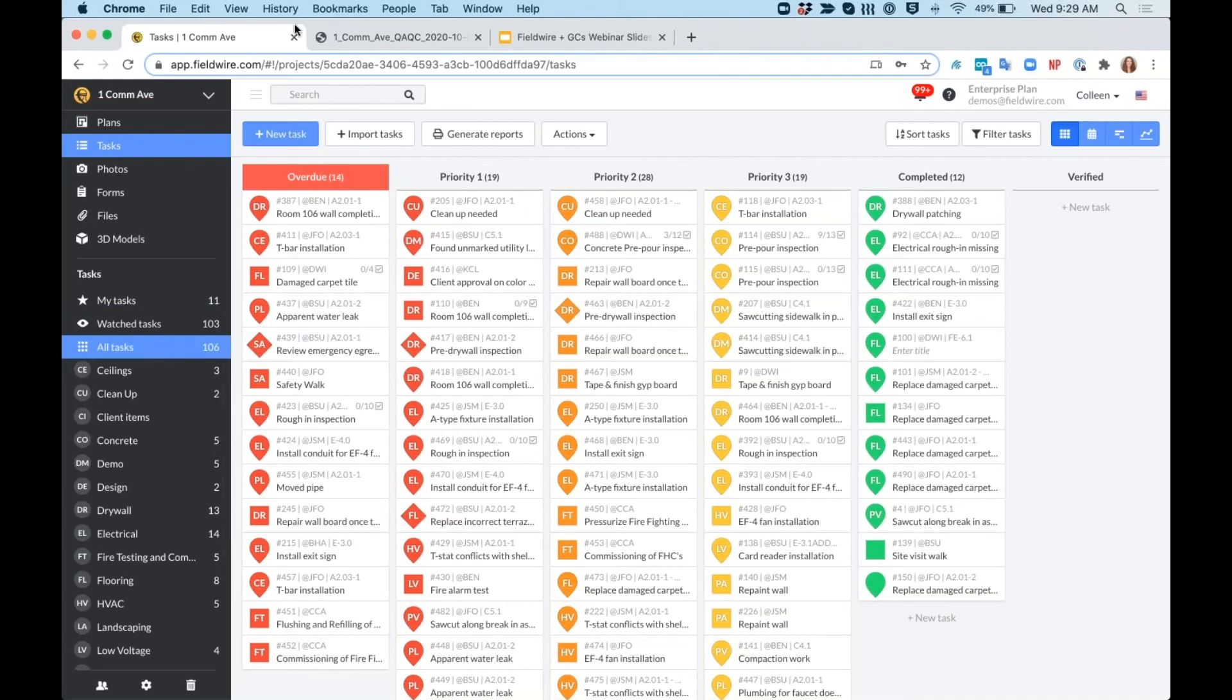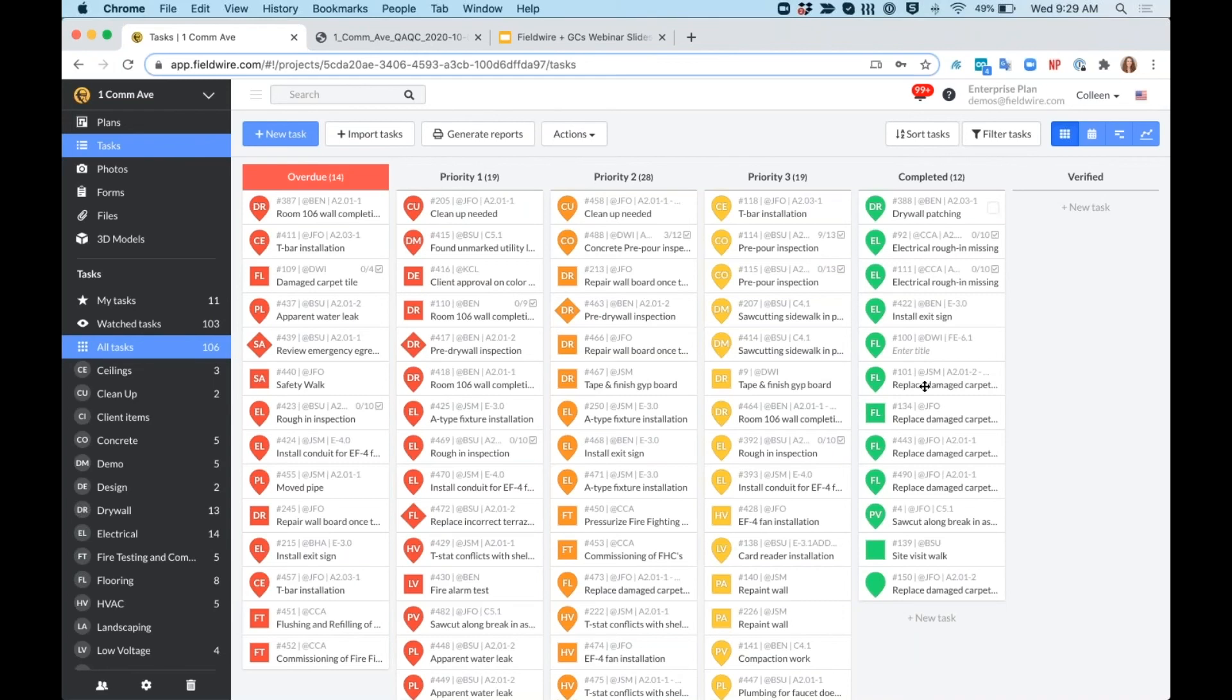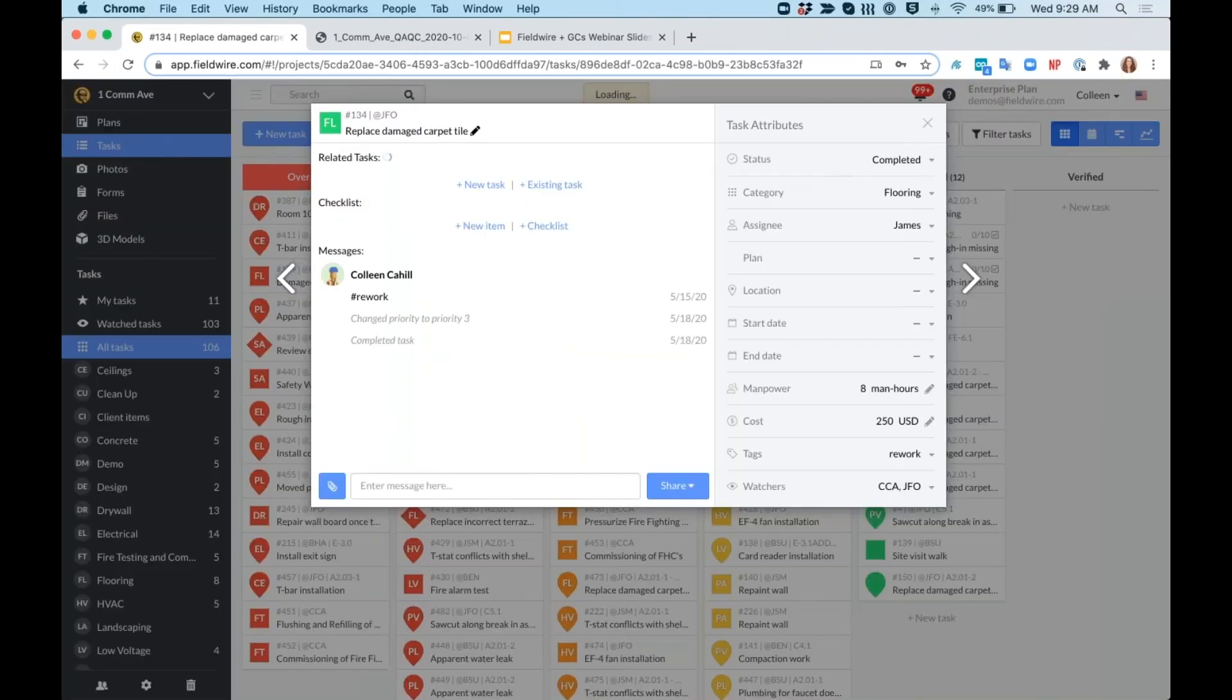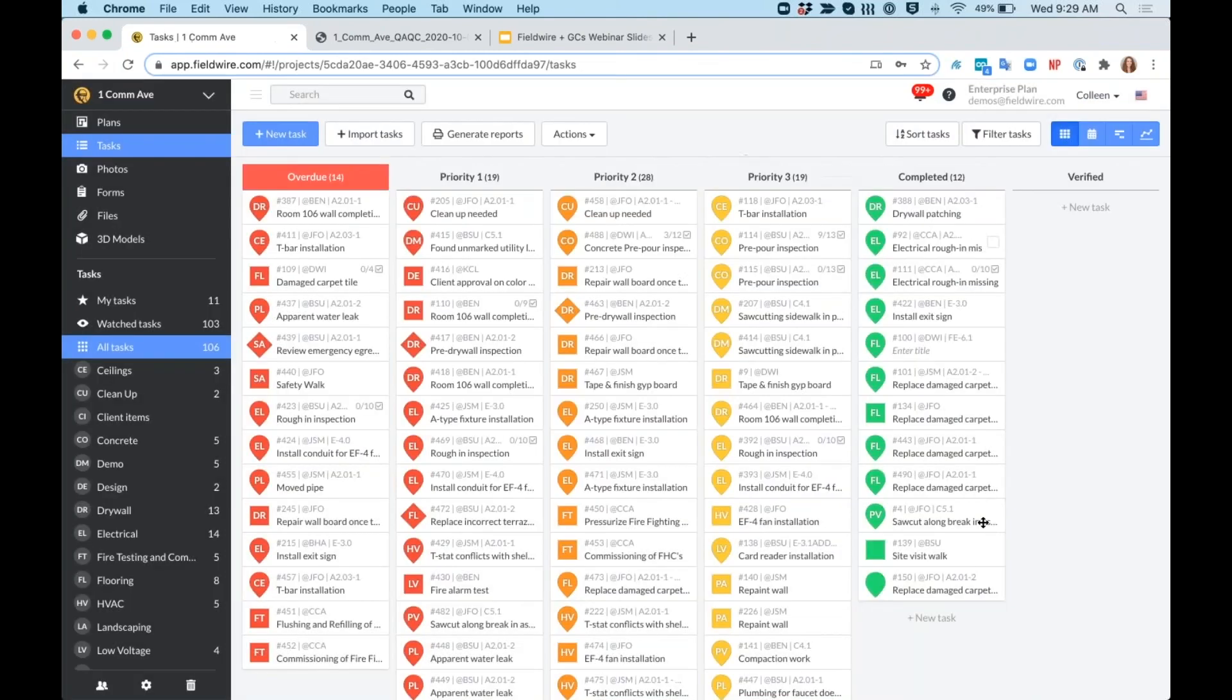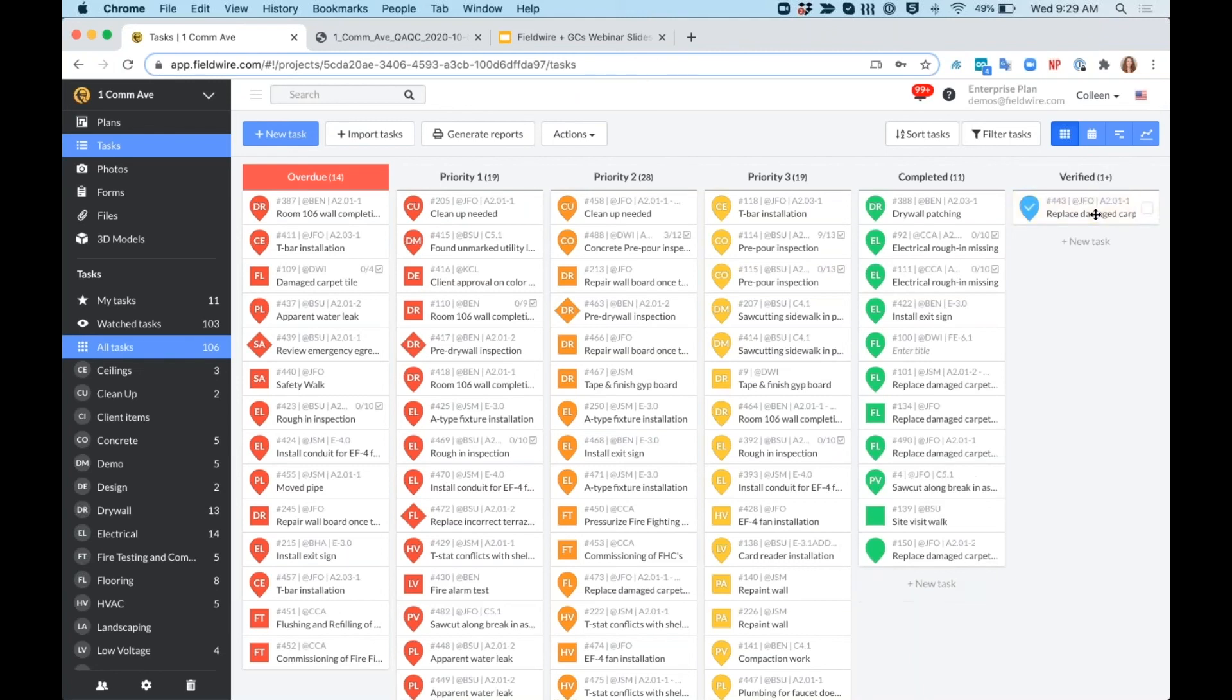If I, as the project manager, am going through and reviewing all my completed items, I can click into each of them and see to make sure that they are completed properly. And then I can go ahead and drag and drop it into verified. My verified tasks will become archived after a certain period of time, which you can dictate in your settings tab. This is just so that you can keep your projects clean and your plans aren't busied up with tasks that have already been completed.